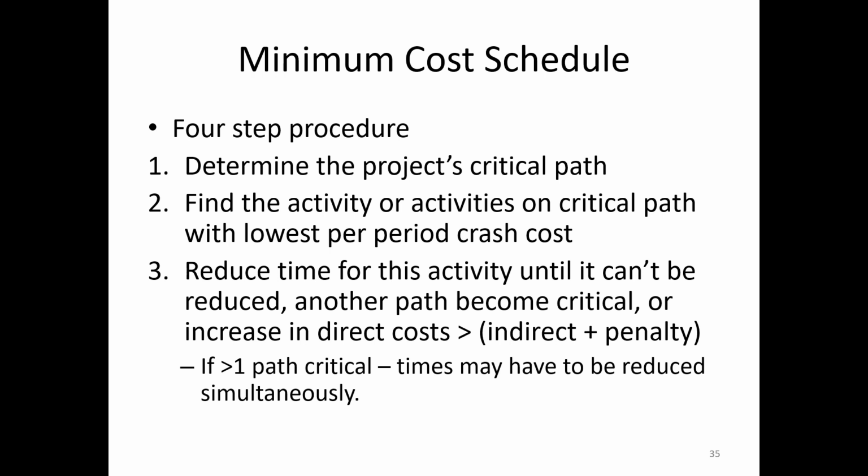Second thing, another path becomes critical. Because one pathway was the critical path when we started at the very beginning of our project crashing experience, doesn't mean it stays the only critical path. We may reduce the duration of that critical path such that there is another path that is now also critical. And we may have a result where we have 1, 2, 3, many critical paths. That's where the fun begins, because then we've got to crash all these critical paths at once. That's where project crashing really kicks it up into the fun stuff. So things get a little hairy at that point.